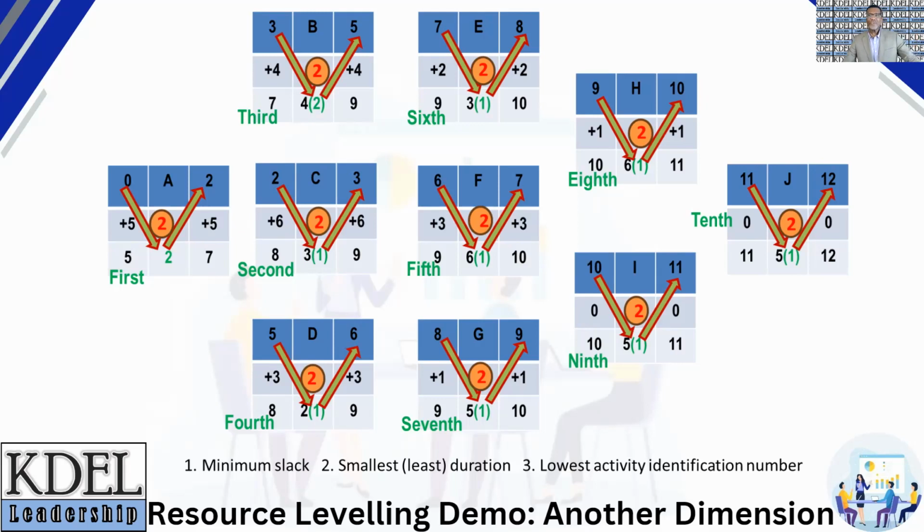As you can see, there's a small circle at the center of each activity, and you can see the number 2 there. That 2 tells you that there are 2 people assigned to that activity. This network diagram now shows that there's more slack per activity. I've done that calculation all the way, forward pass, backward pass, calculating the slacks, okay? So it shows now that there is more slack per activity, except for activities I and J that now have 0 slack. And the durations for each activity have considerably reduced.